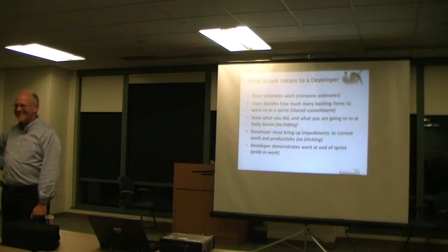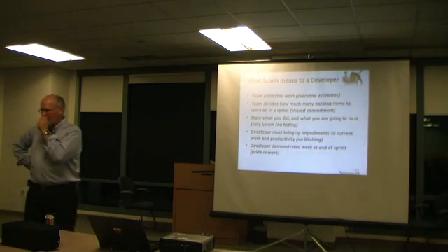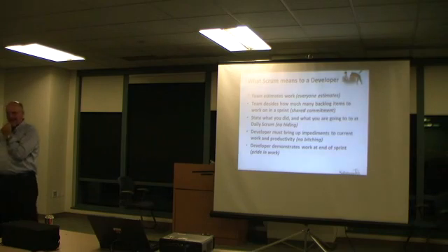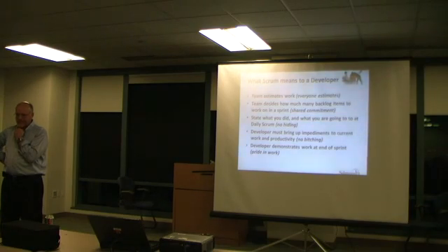Yeah, it's interesting. Two comments. One is that if you're in a Scrum and you say, I'm still working on what I started yesterday, that's an anti-pattern. You shouldn't be having stories that long, hopefully. The other is that I've been on a Scrum team that didn't allow pairing, so it was really difficult to mentor.